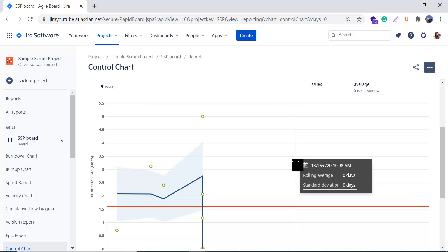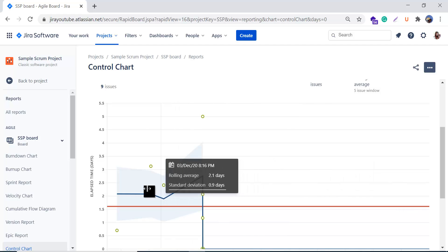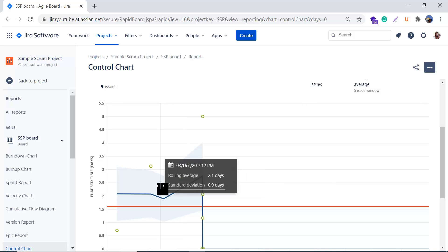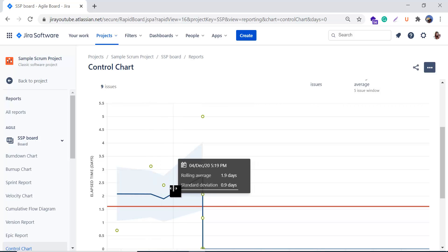The blue shaded area of the control chart represents the standard deviations — it shows the amount of variation of the actual data from the rolling average. Standard deviation gives you an indication of your confidence level in the data. If the blue shaded area is narrow, you are on track with less cycle time variation. If it is wide, there is something wrong that you need to figure out.